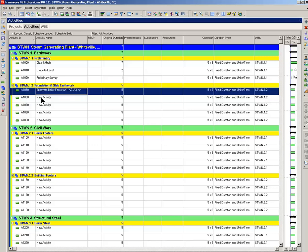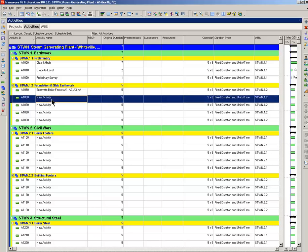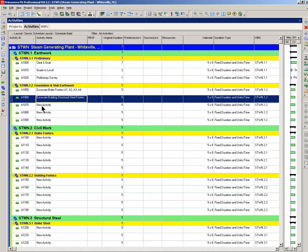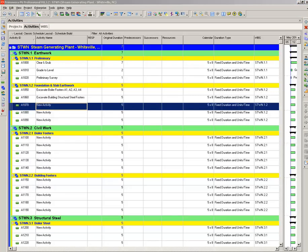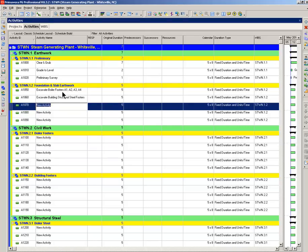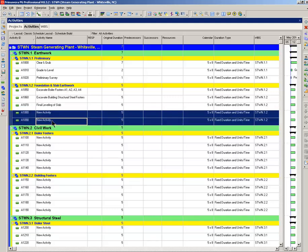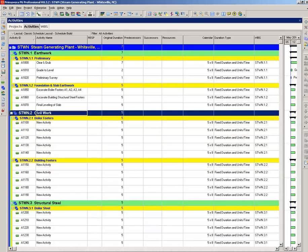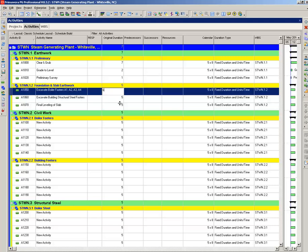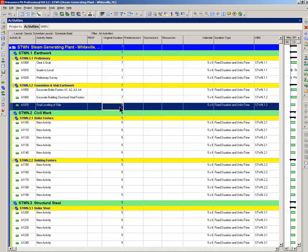So, we have excavate boiler footers A1, 2, 3, and 4. Now, we're going to excavate footers for the building and final leveling of the slab. Make sure everything's perfect before we start doing any concrete work. We hit the shift key, get rid of those. And let's call that six days, seven days, and two days.